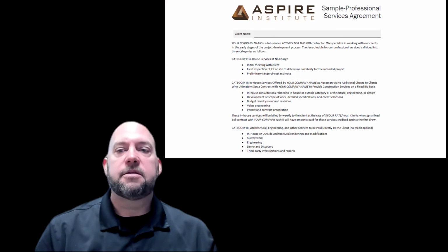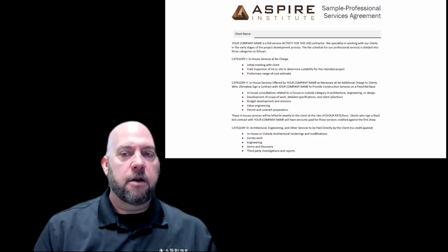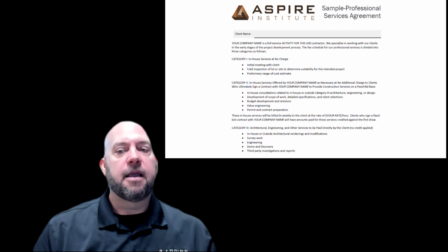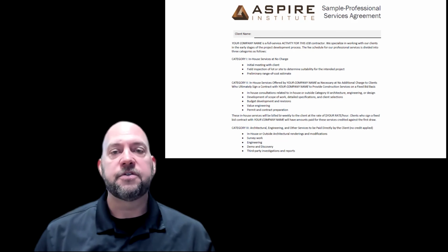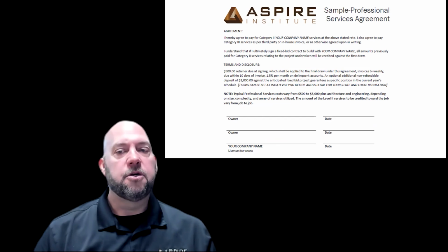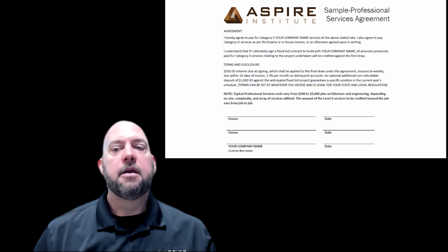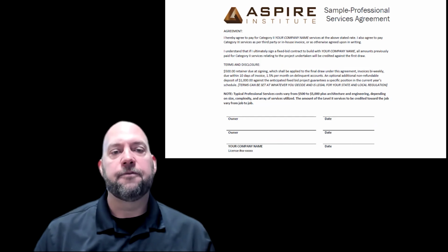This is one of our PSAs. You're welcome to take and use it. We have three categories. The first category is that first initial meeting. The second category is you signing the PSA and getting paid for your time to develop out the project. And the third category is if there's any third-party services, you would bill them for those separately. I like to do it on a retainer basis. You can set the retainer for whatever you feel is appropriate, but it allows you to get paid for your time to partner with the client and to be their advocate through development of their project to ensure that they get the outcome they're looking for and that you hold that budget.